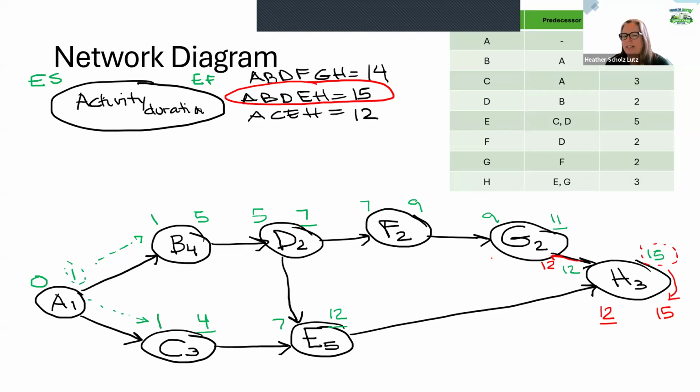So it'll be 12 minus 2 is 10. There's one going backwards into F, so that's 10 minus 2 is 8. And again, there's one going into D here. So if we follow that back, or no, sorry, there's two going into D. I was getting my arrows mixed up there. All right, so we have to do E here. Again, it's one connection, so this is 12.